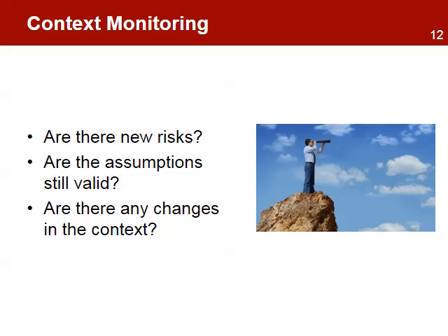The project manager should monitor for new risks or changes in current risk. This will require a review of the original risk management plan and a reevaluation of the risk analysis estimates. For example, changes in probability and impact of current risk, identification of new risks.